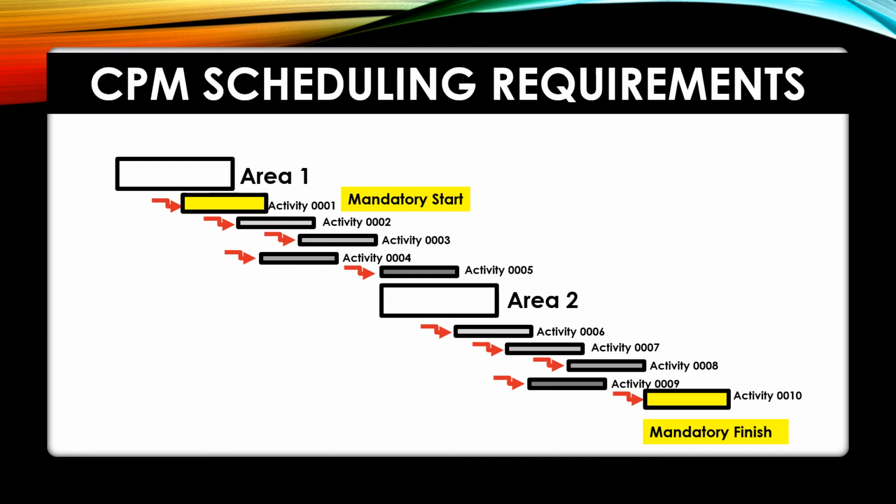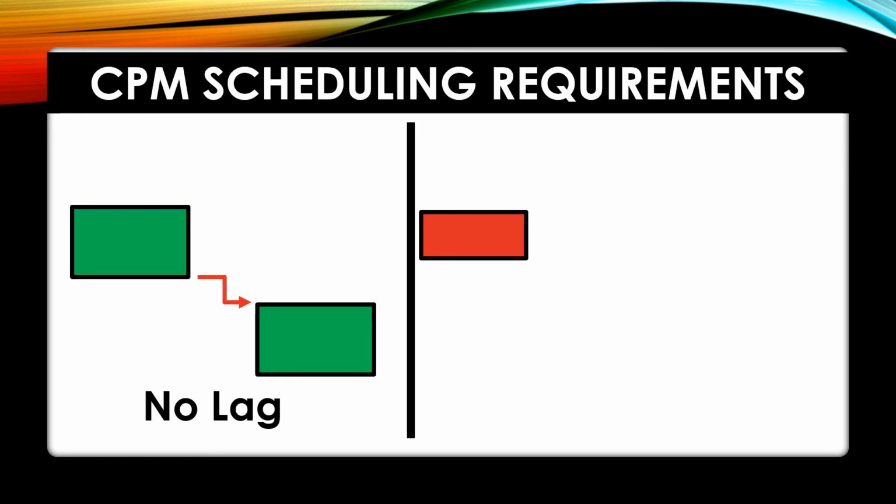Most of your schedule needs to have straightforward relationships like a train car. That way everything moves together. If one activity moves, then everything moves, impacting the schedule. So there will be times you will need to use constraints, but just make sure that when you do use them, that they're justified.